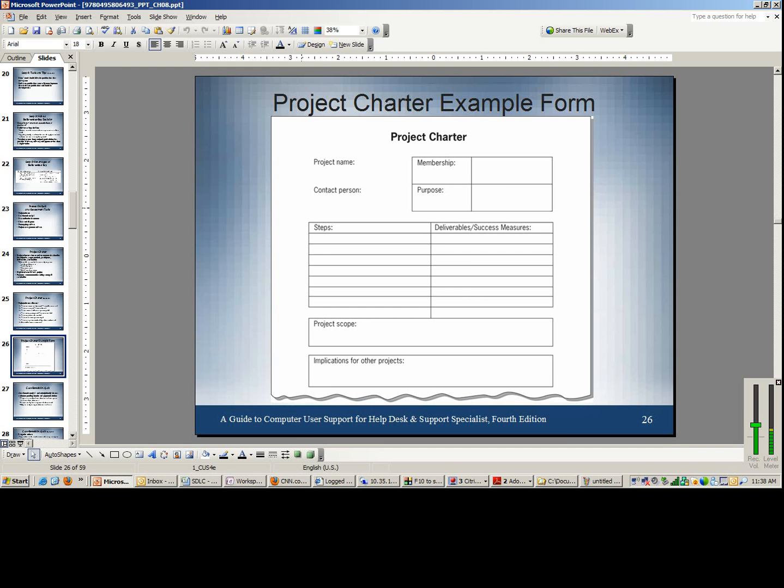Once a project manager comes up with a very good project charter, that documentation needs to be sent to the project sponsor and the key participants to the project for their review. If they say yes, we're willing accomplices to this strategy, to this timeline, then they're going to affix their signature on this project charter, and then the project charter gets carved in stone, meaning that it would now become their Bible.